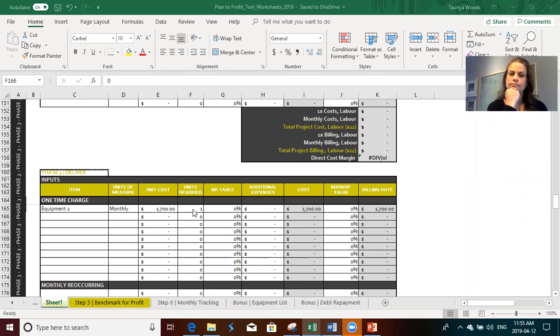If I'm putting the equipment in, am I putting it in at its cost for the 8 hours in the day that it worked, or at its cost for the whole month? It's up to you. No, I'd have to put it in by day. It's totally up to you. If it's a day project, then put it in by the day.